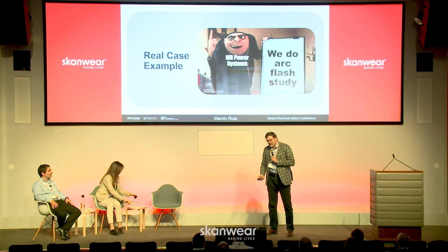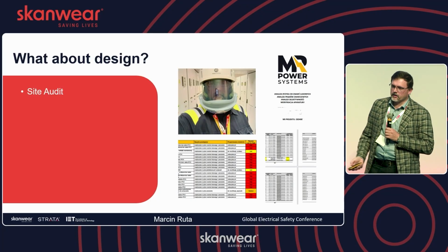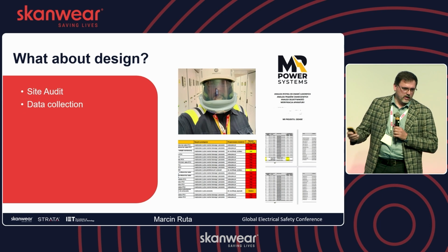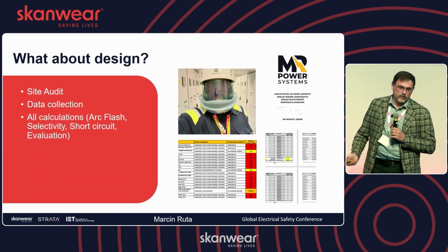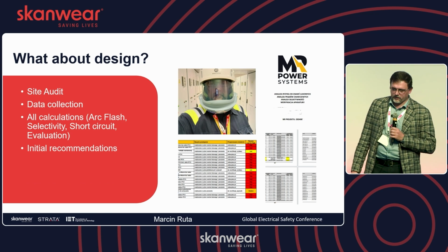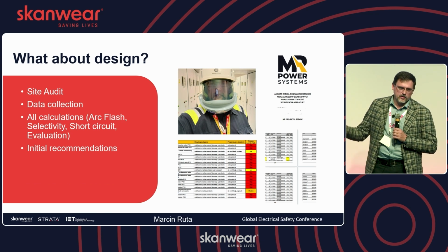Sorry. So, I will give you an example of how we did this recently in the last project on our customer side. We did, just to wrap up what we told you, a site audit. We found a lot of issues. We did data collection for the process. We did all the calculations and a bit more that were necessary. We did some initial recommendations.